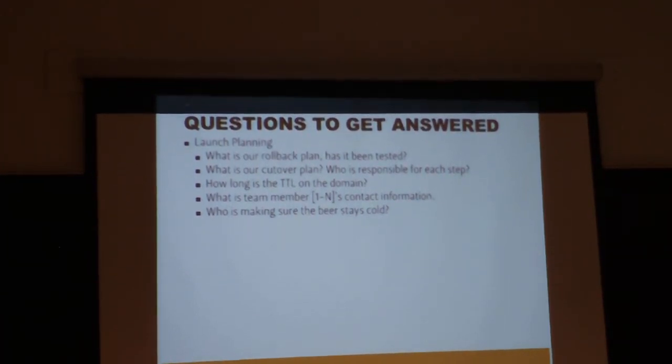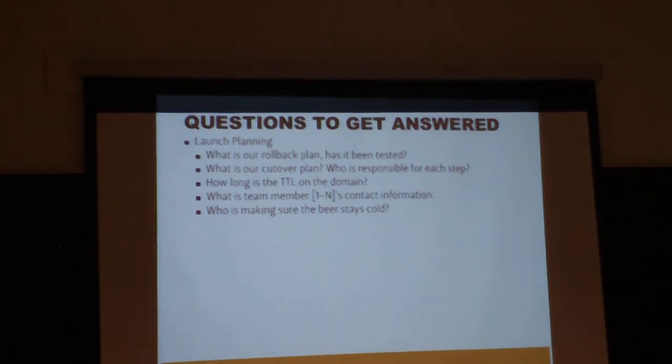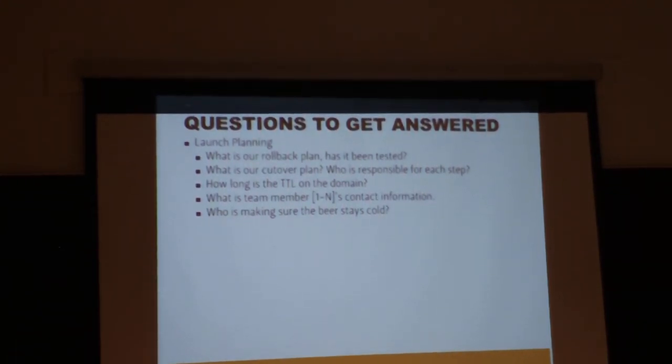And that's not always just a quick switch. Sometimes there have been migrations. If you're a really active site, you're getting new comments put in right away. So you need to have a full plan of going back to the old system. Always prepare for it, because it's not that it's going to go back and stay there, but it might have to go back for a day. Or the idea is, if we get this far along, there's no rollback. Have the plan, but you're not going to really do it, because ideally you're going to push forward.